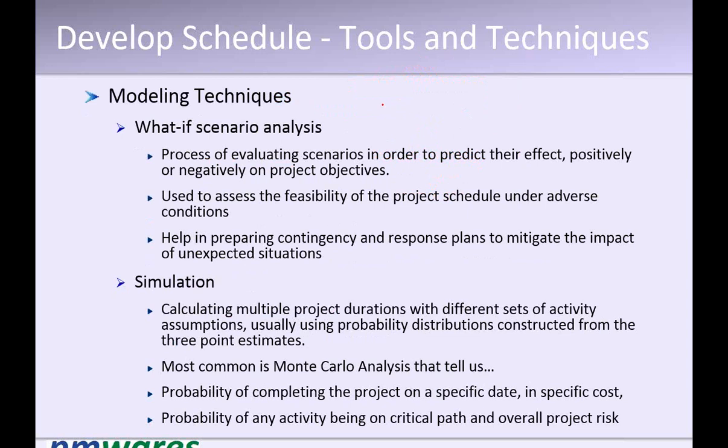Out of 5 simulations, in 3 you are reaching a particular budget. You can say this budget is most likely. Second thing, duration also. What is the most likely scenario of completing the project in a specific duration.